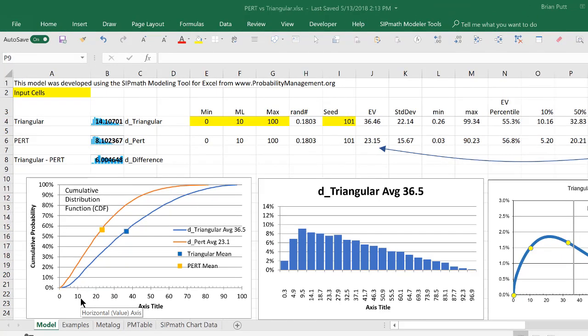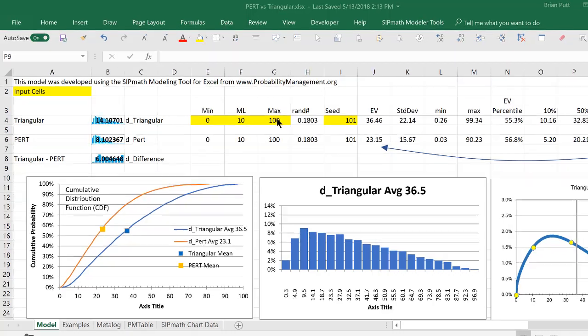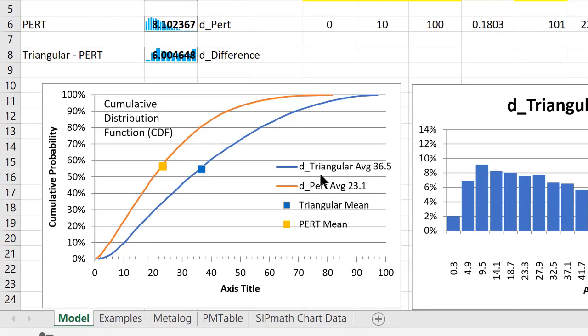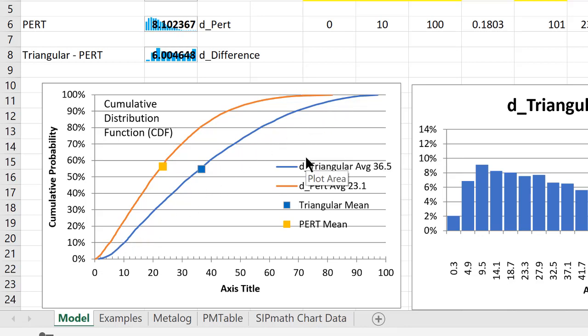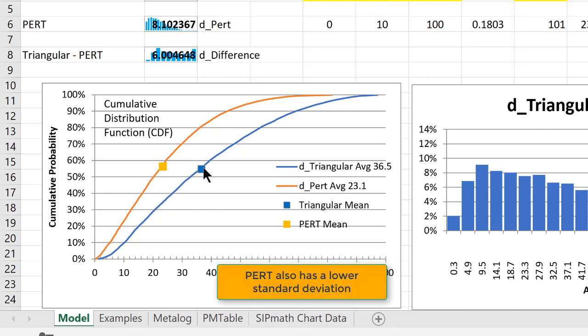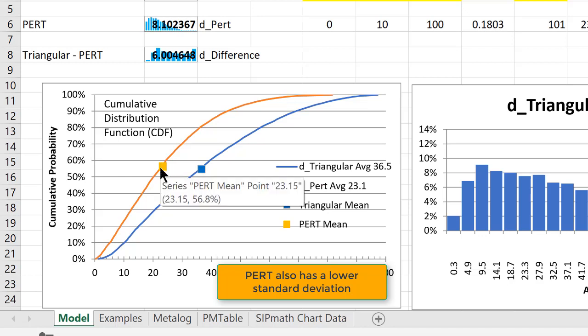So in this particular setup, the 0, 10, and 100, the PERT distribution is giving me a distribution that looks like this, and the triangular here. They both have an expected value, as shown by the squares, slightly above P50, but you can see that the PERT distribution has a much lower expected value.